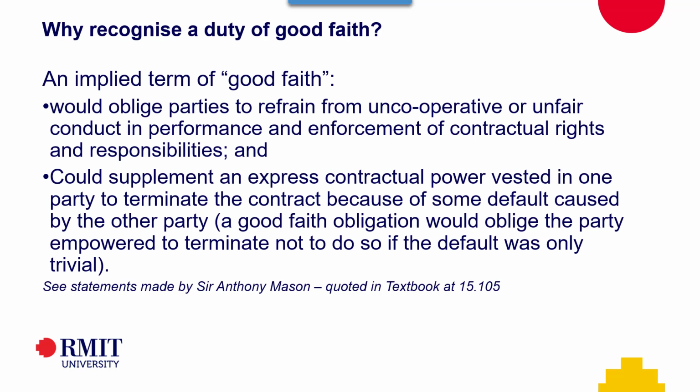And the other side of this is that a duty of good faith could supplement an express contractual power vested in one party to terminate a contract because of some default that the other party has made, so that they could only use that right if it's fair.